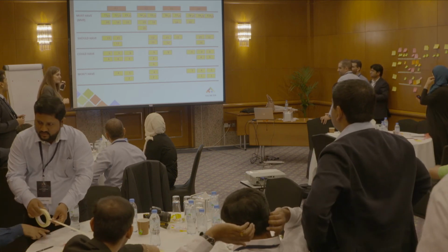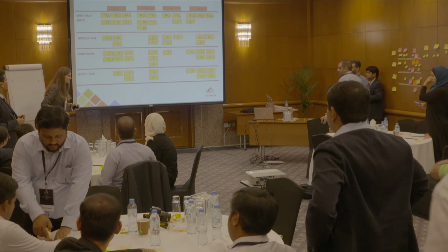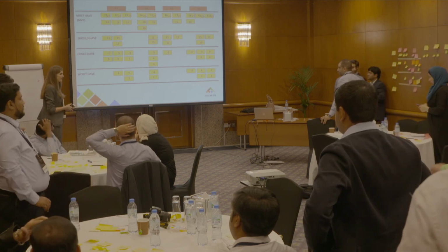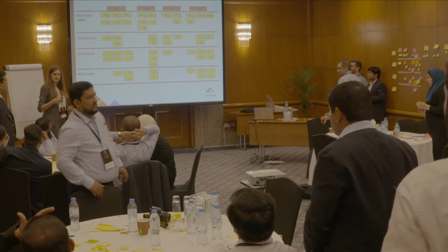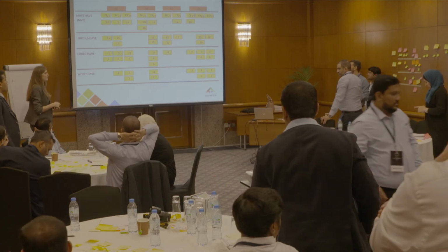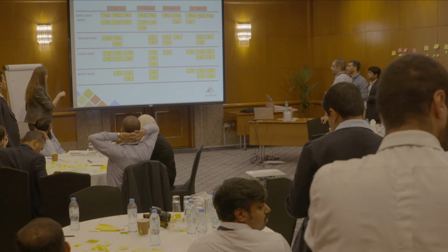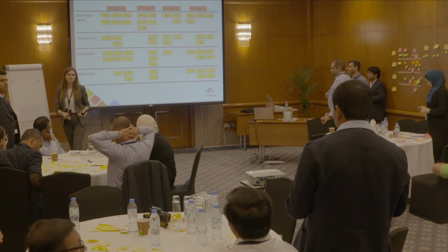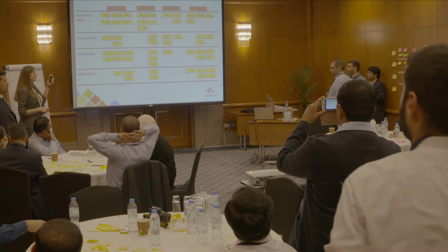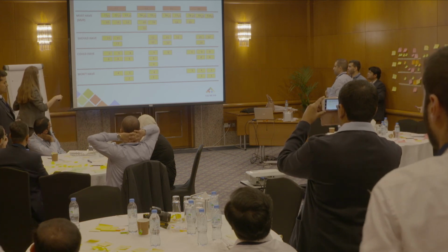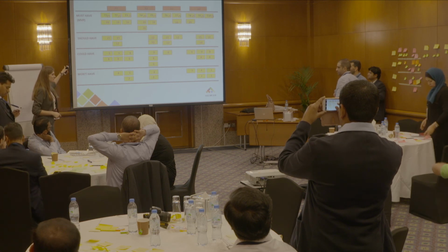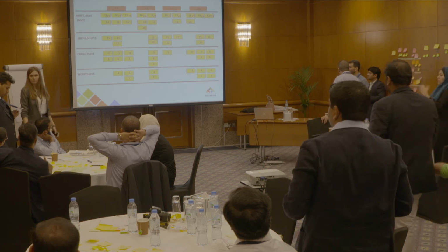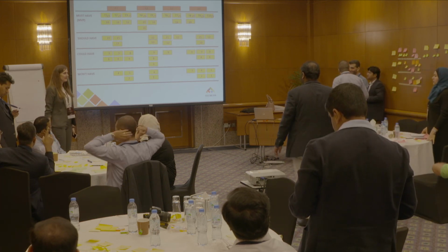Even the MVP, we can break down into smaller releases, or now we have the priorities, we know what our product backlog is, and we focus on sprint planning, etc. What's also useful is to give some rough estimates about how long the MVP will take so that the product owner can do the planning with the customers, etc. But if we are doing Kanban, for example, we take the MVP tickets and add them to the Kanban board with respect to priorities. The other releases stay in the backlog and wait for the time when we can release them.